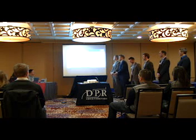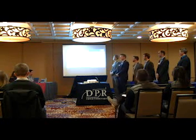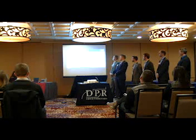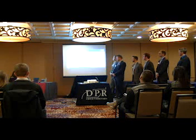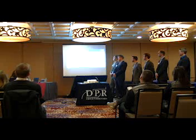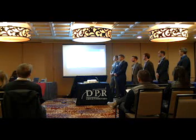So that's enough about the contracts. Let's get into the subcontractors. First off, the exterior glazing. We chose to go with the glazing guys. We chose them because they were the highest cost, but they did have the most inclusions associated with their scope. And they also had a lot of coordination with the subs and us as the GC. So that'll be very beneficial to everyone to help make sure the job runs smoothly.